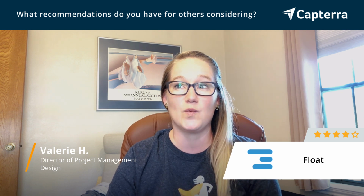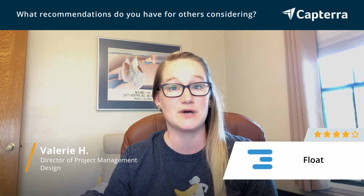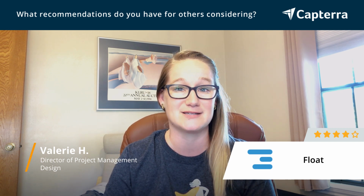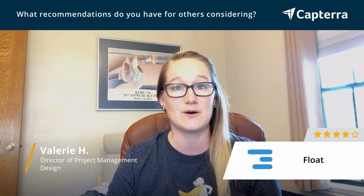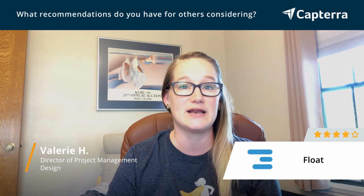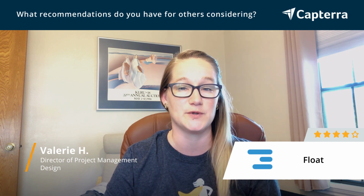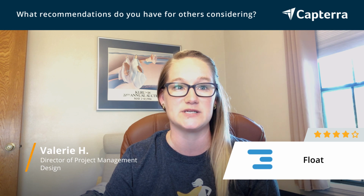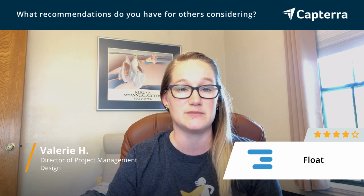I would say one thing to consider is what you're using to do your project management elsewhere. Other software, Teamwork does not integrate with Float, so it's a manual process to keep it updated each time a project shifts. There are some Float integrations, but I personally don't use them at the moment. So that's just something to keep in mind. Do you have the resources available to keep it up to date, to make sure that that data is always going to be usable and in a good way for your team to stay up to date?